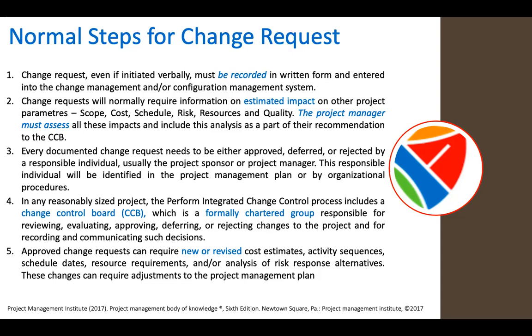The project manager must assess all these impacts and include this analysis as part of their recommendation to the CCB. CCB is the Change Control Board. Every documented change request can be either approved, rejected, or deferred.